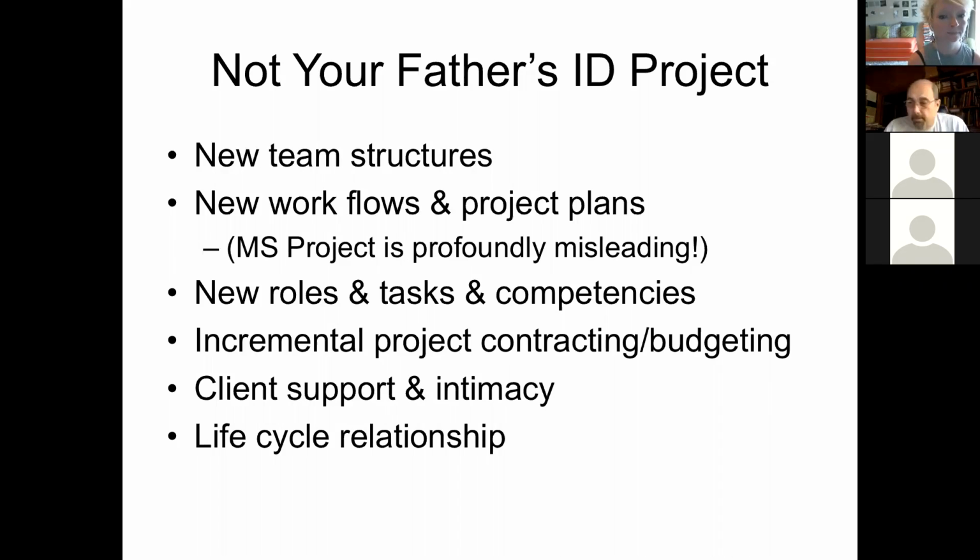If you try to model an Agile kind of project in Microsoft Project, it will cause you to make mistakes. It is designed for linear projects only, and it'll drive you nuts if you try to model an Agile project. Lots of different roles, lots of tasks, lots of different competencies required. So this is not something you can just step into.